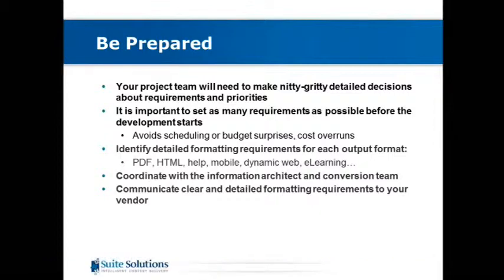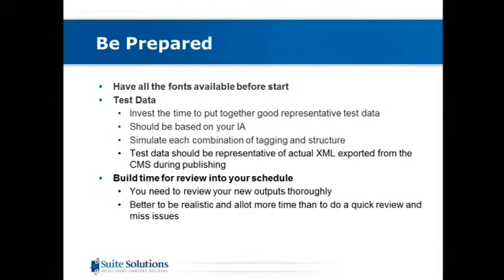Have the fonts available before you start the project. For some things, it's not going to be a big deal, but if you have any specialized fonts, you need to know ahead of time, and you need to have licenses before the project starts, because again, things will run into issues if you don't have everything prepared ahead of time as much as possible.